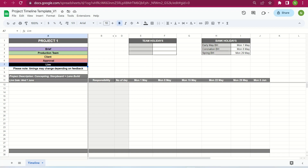I've popped a disclaimer here that says: please note, timings may change depending on feedback. So if you've accounted for one day to turn around client feedback, but the level of feedback shared by the client is quite a lot and it might take longer than one day, then you would need to adjust the timeline to accommodate, say, two days to work on that client's feedback.